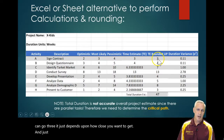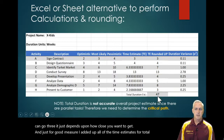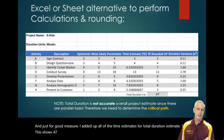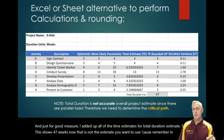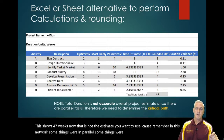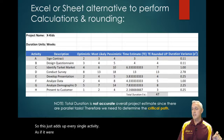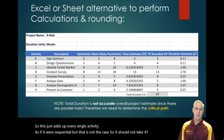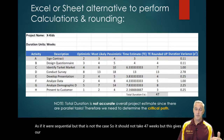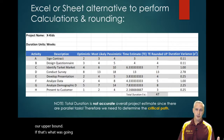Just for good measure, I added up all of the time estimates for a total duration estimate — that shows 47 weeks. However, that is not the estimate you want to use. Because remember, in this network some things were in parallel, some things were in series. This just adds up every single activity as if it were sequential, which is not the case. It should not take 47 weeks. This gives us an upper bound, but that is not a number you should use.